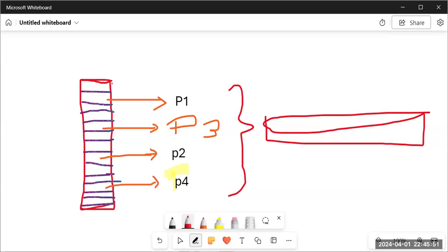So when we are breaking it down, initially all the broken down items will be called epics, and post epic, these epics will be broken down into various user stories. What will they be called, everyone? User stories. Yeah, user stories. And directly on these user stories, the team will start working.